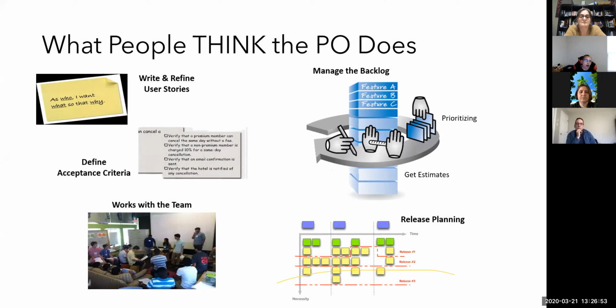Let's go back and think about why they wrote the Scrum Guide and what they were trying to solve for. Kind of back to someone who said, I'm trying to get them to think about the problem and not the solution. Well, the problem that they were trying to solve for is that development staff didn't really have that single voice, that business interaction. It took a long time to get information back. There was a lot of confusion about what was needed to be done. So they designed the product owner role to actually say, here's a certain person that's going to really interact with the development team and provide us the needs that we need and solve that problem. And that's great. That's fantastic.